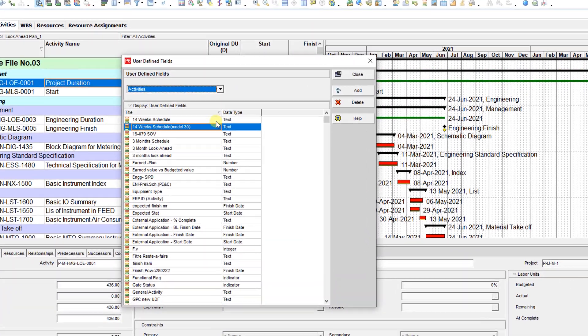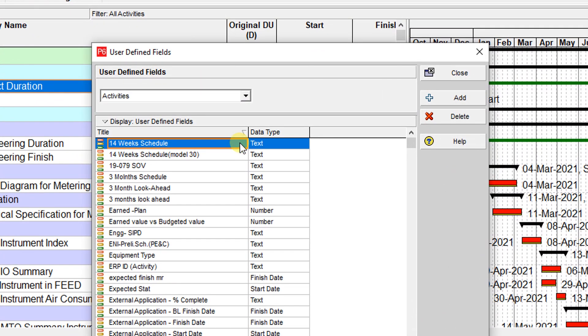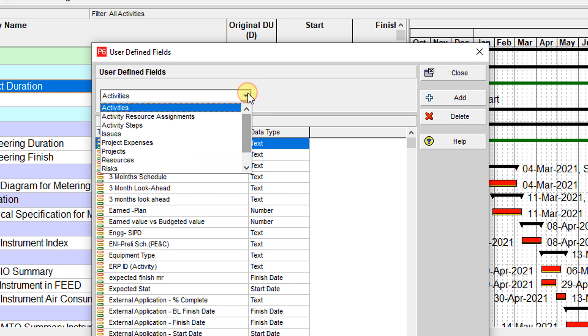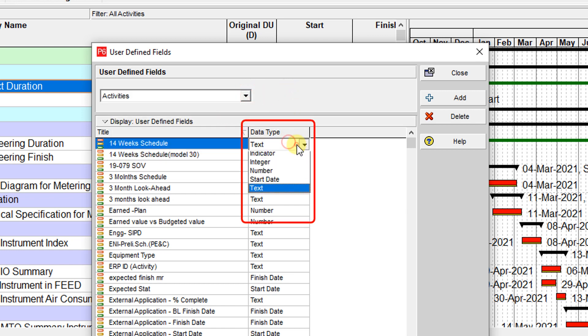When you create a user-defined field in Primavera P6, it doesn't matter which field you select. The thing is, you should select the proper data type for the user-defined field. If you fill your user-defined field with some data, then you cannot change it after you fill it with data. We have seven types of user-defined field data types here.